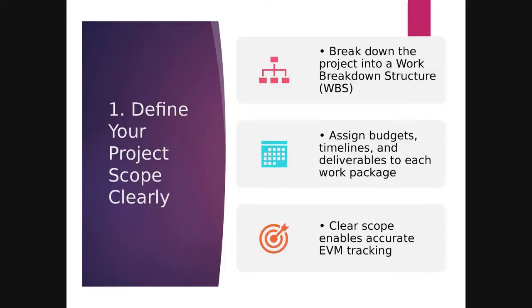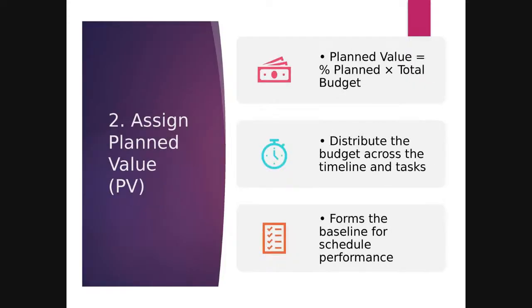And when you attribute a certain level of effort to a project deliverable, it has to be accurate. Otherwise, your earned value is going to be garbage. See? So, for you to have very good earned value metrics, you must start off with a WBS. You must break down your WBS budget into those silos. We call those silos control accounts. So, your control accounts have got to be bulletproof.